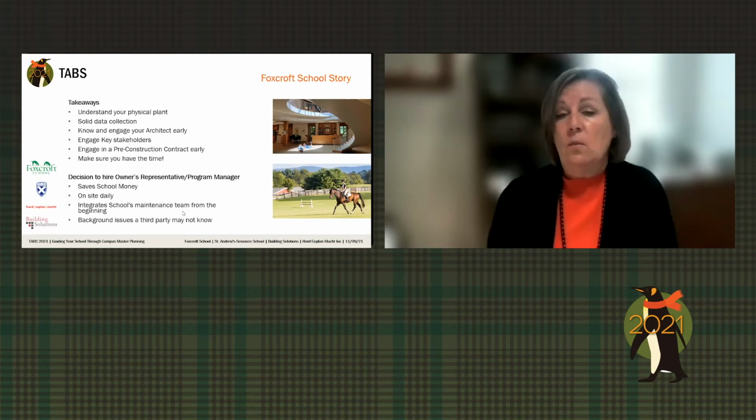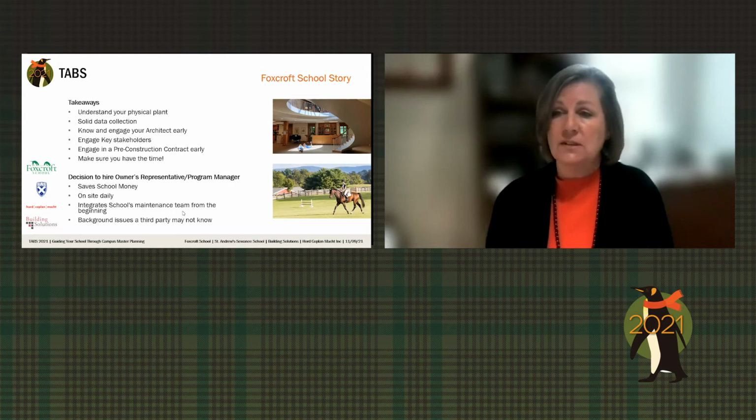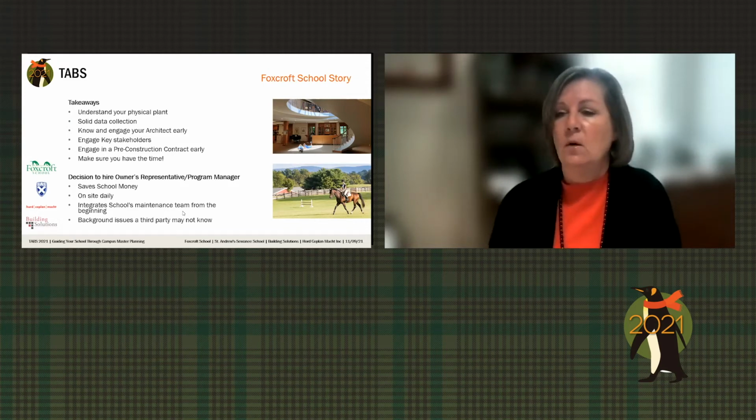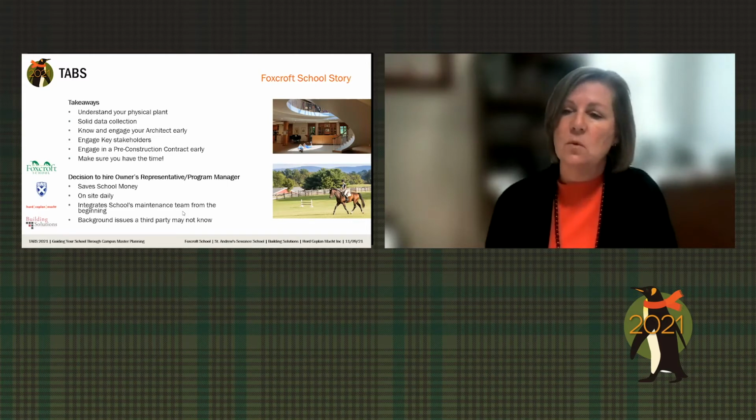And then also with me being on site, there's some back issues that maybe a third party wouldn't know. So a perfect example, we just redid a wonderful little building into a music building that 8 years ago had an oil leak. And when we started to do work for the sump pump, that residual oil showed up again. Everybody panicked, but because I knew what had happened 8 years earlier, we were able to mitigate it, move forward, contact the right people so that it didn't hold up the project. So those are some of the reasons why we chose to do it in-house versus an outside firm.